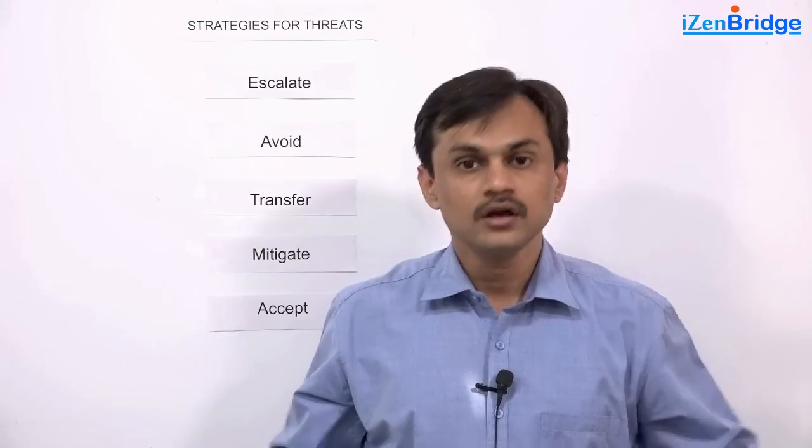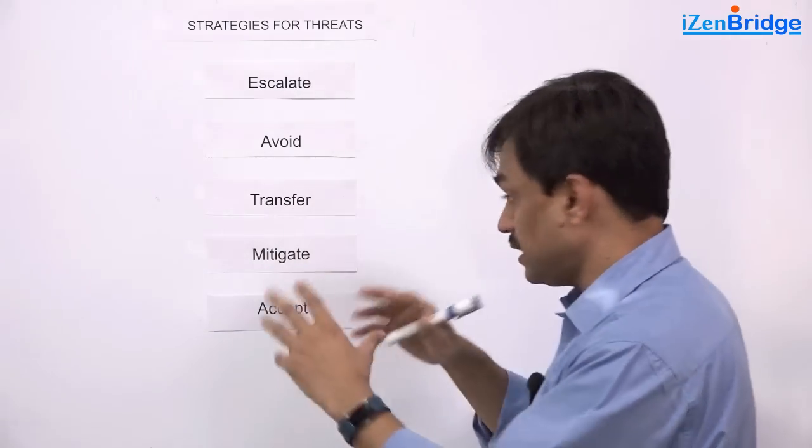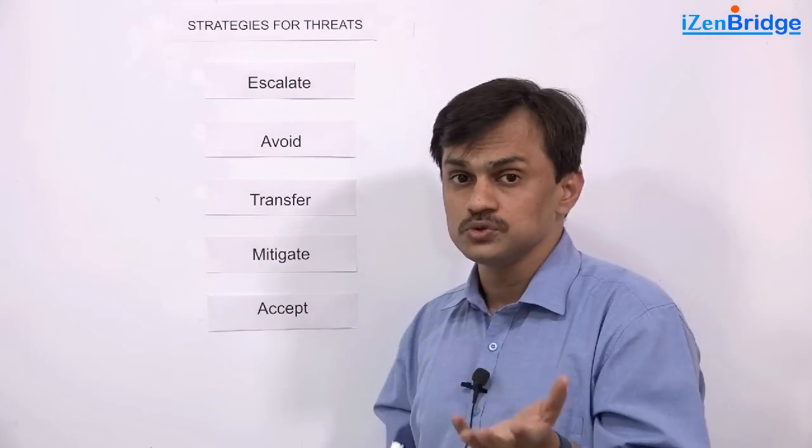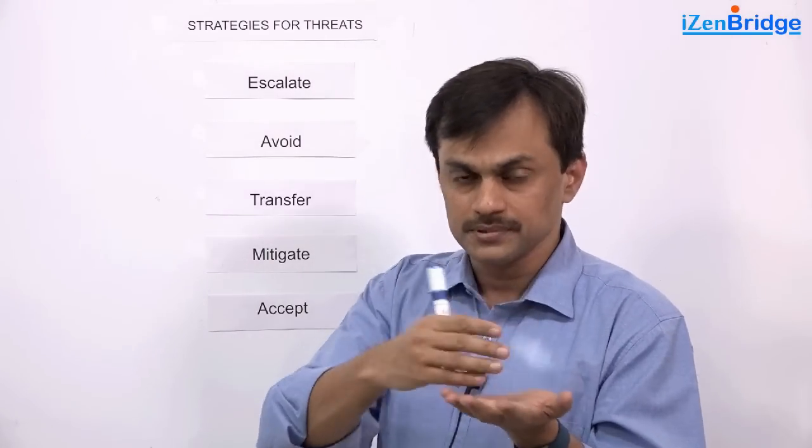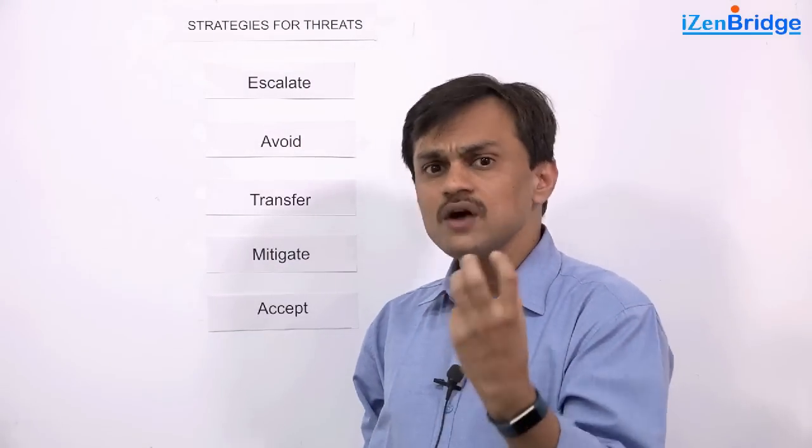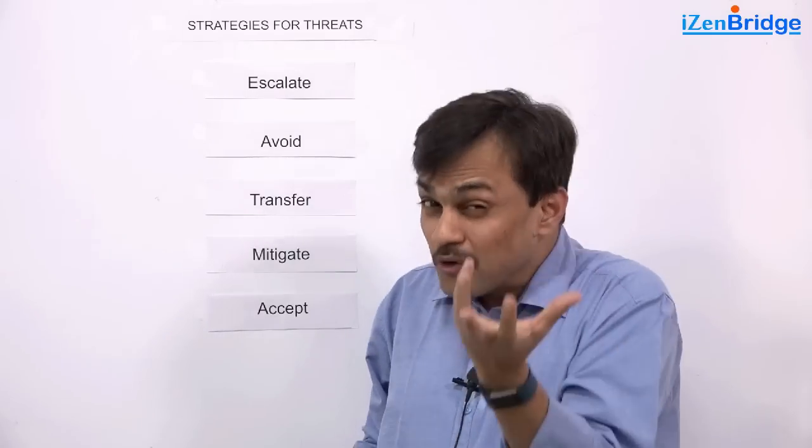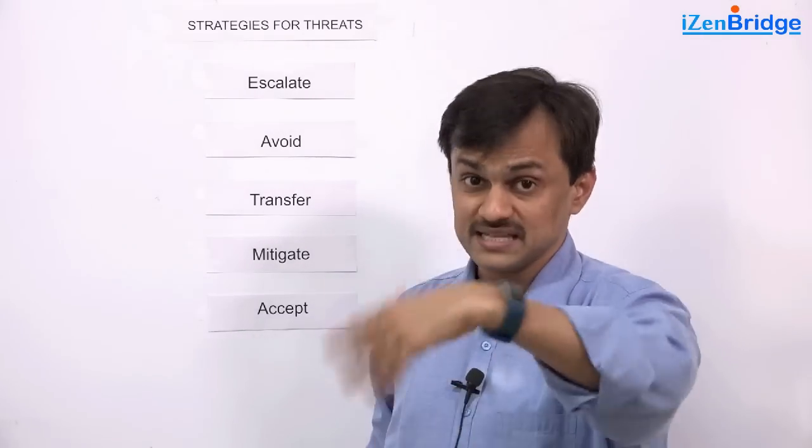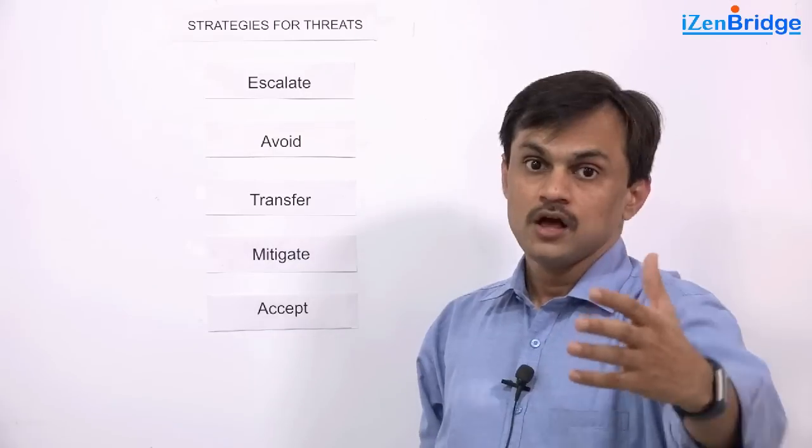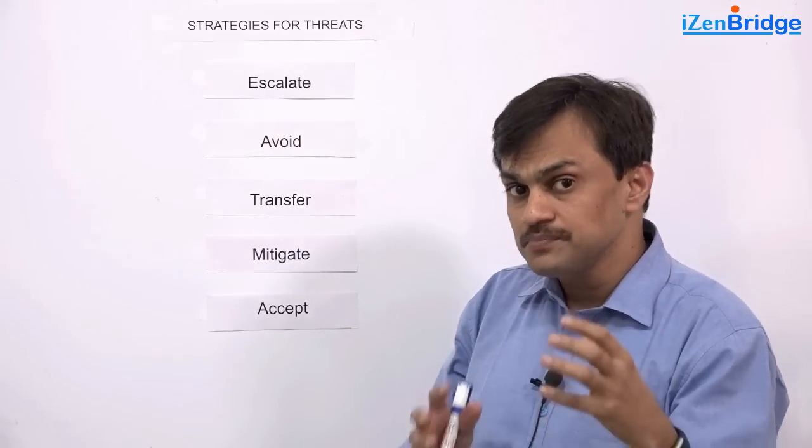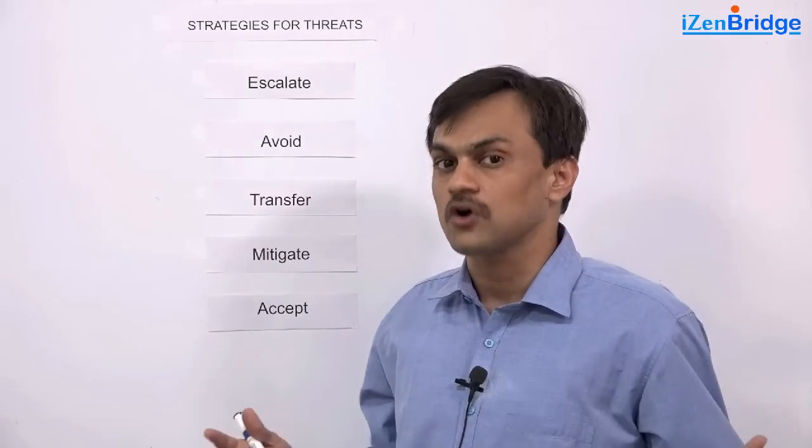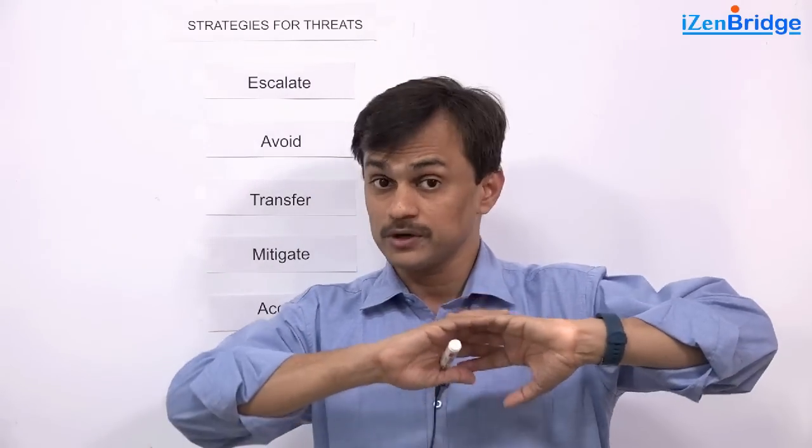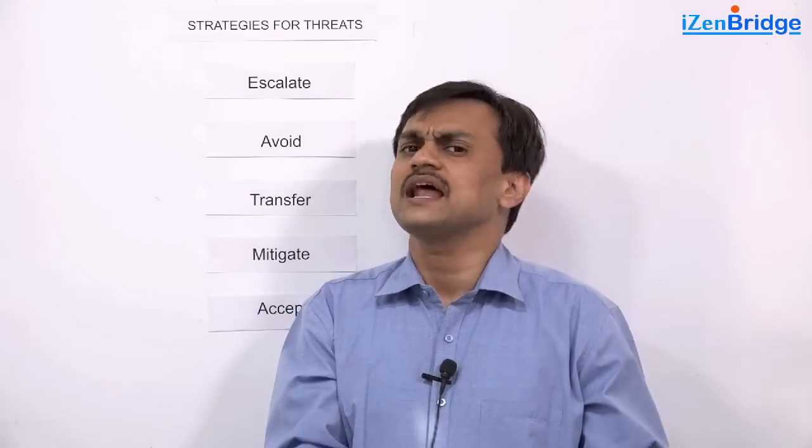Say if you are working in an environment and you are planning to use - there are two to three platforms possible on which you can build your application. And you have one platform which looks promising but if it doesn't become stable in the next six months, your complete investment goes away. Now you have a huge risk which, if that happens, your complete investment is gone. You may want to avoid it. Either you want to make sure that that risk, the probability of occurring that risk is zero, or you want to do something else. You don't want to select that particular platform.